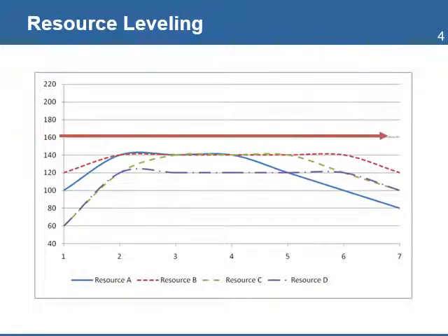Resource leveling is a project management technique used to examine the unbalanced use of human resources over the life of the project. It is used for resolving overallocations, underallocations, or allocation conflicts, with the goal to allocate each resource to no more than its maximum time available to the project. The goal is to distribute as evenly as possible the work effort to all people involved in the project.